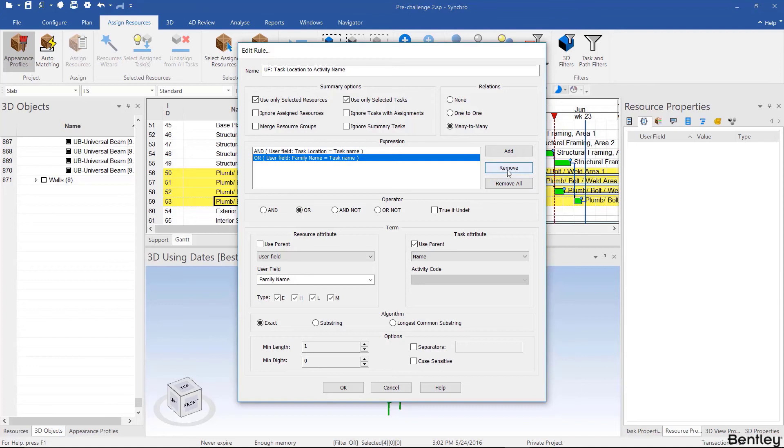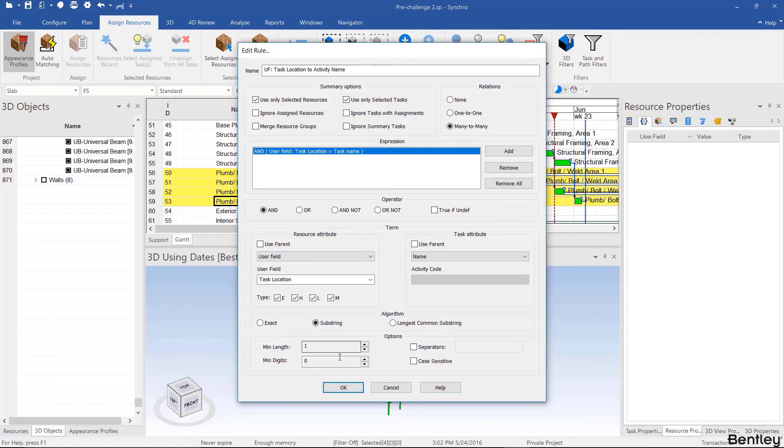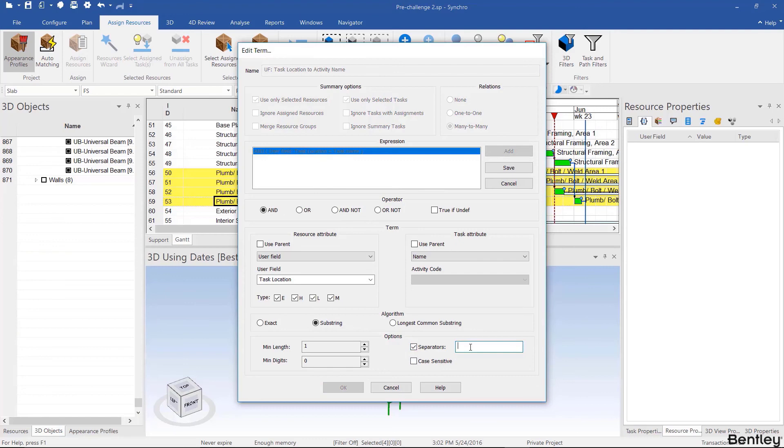For exact versus substring, exact is used when you're matching exactly something to something else. In this case it's a substring. Exact means the task name would have had to be area one or area two. A longest common substring is also a version of substring. Separators is used when you have an exact match that's in between, for example, dashes. So you can use separators and just type in a dash, but then you'd use exact instead of substring. And then you know what's case sensitive.